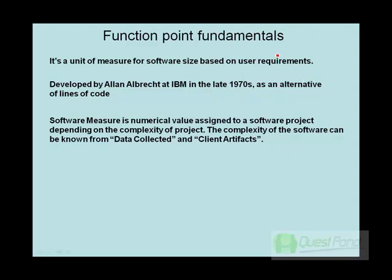The most important factor in the definition is user requirements. Whenever you estimate using function point, the user's perspective is critical — if the user doesn't see that aspect, you cannot estimate it. For example, you may have a Windows background task running behind a customer screen, but if the user cannot visualize why the task is there, you probably cannot estimate that using function point.